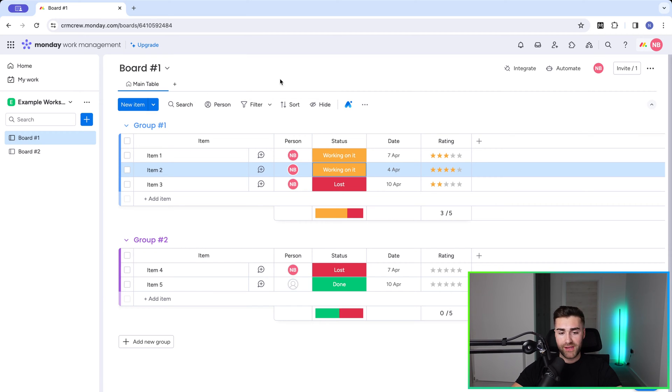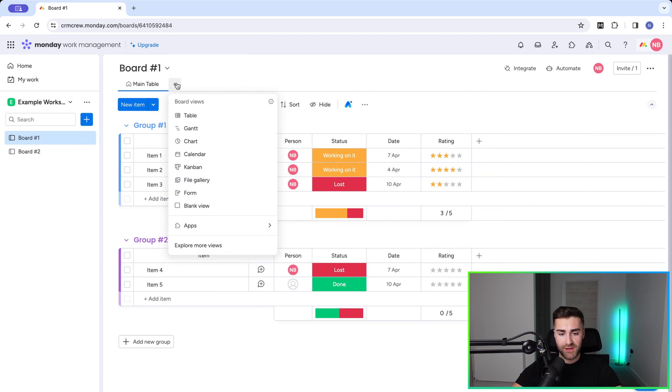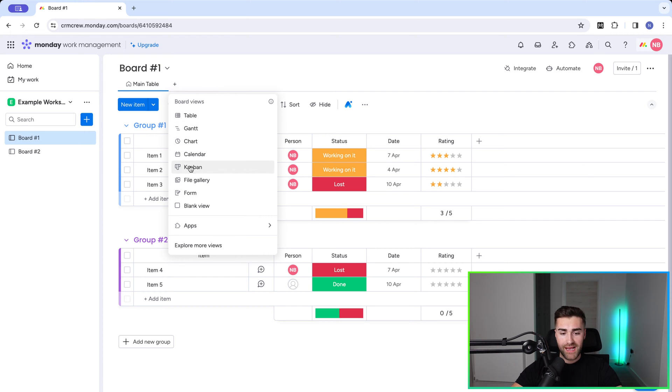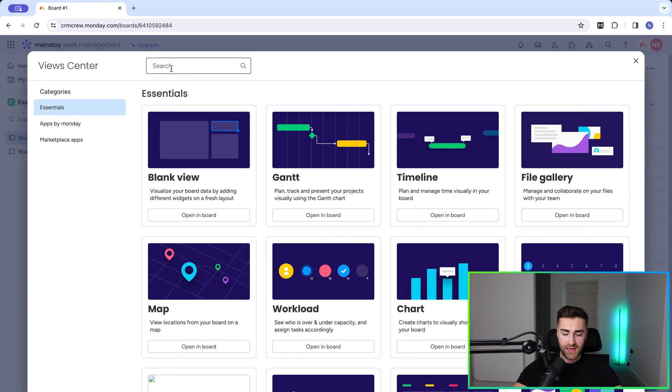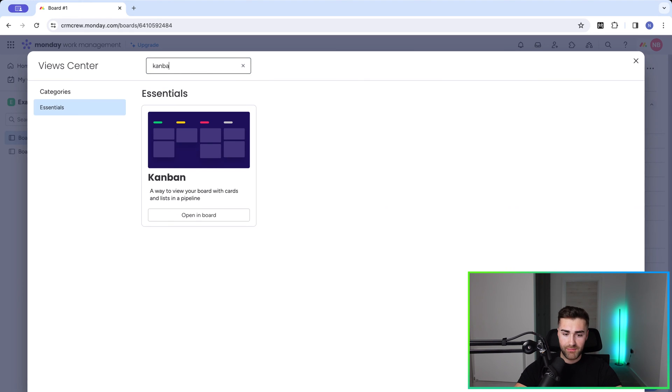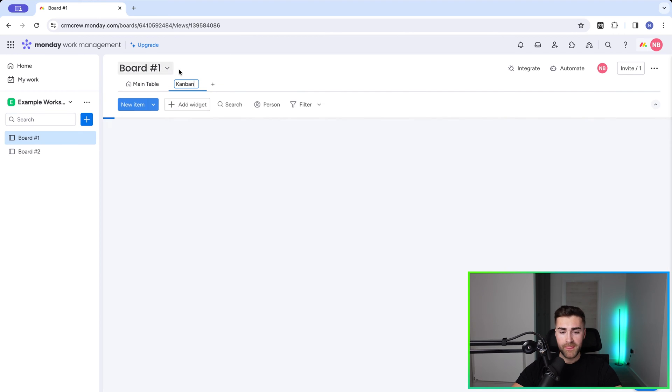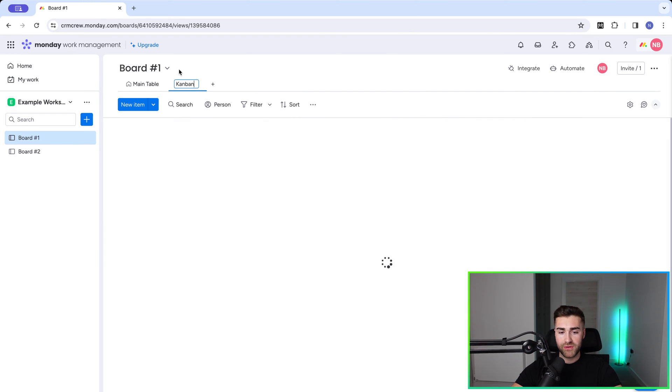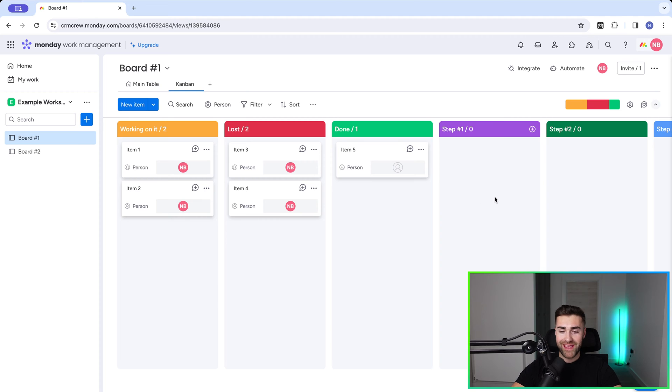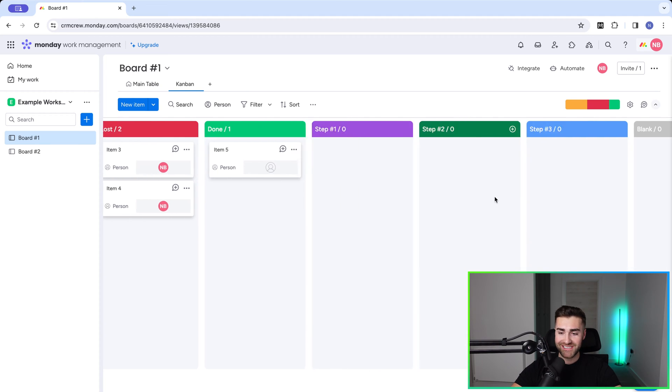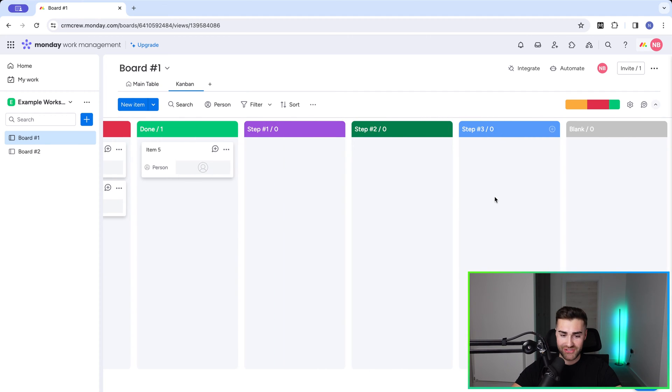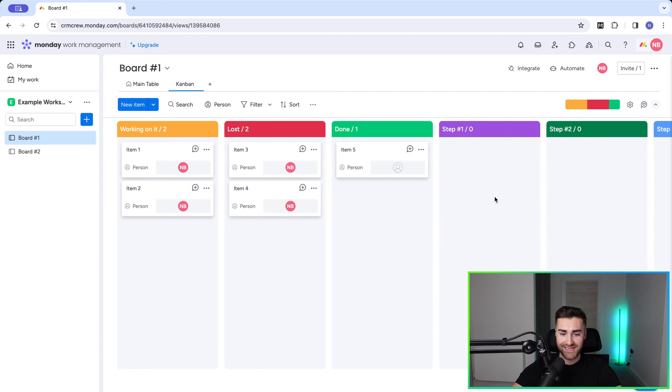We then want to go ahead and add the Kanban view which is the plus option in the top left hand corner here where the main table option is and we're going to look for the Kanban view. Now this is this option here. If we are unable to find it go to explore more views and search Kanban and there you go. Select the open in board option and the Kanban view is automatically going to populate and you can see here you've got the various steps that we've just created.